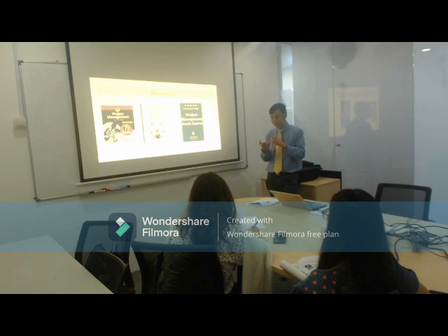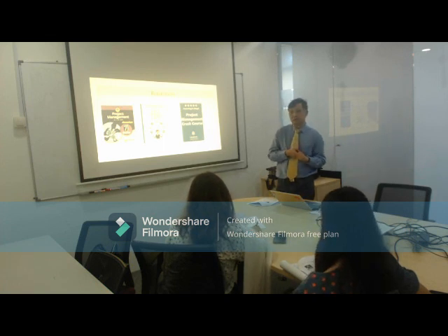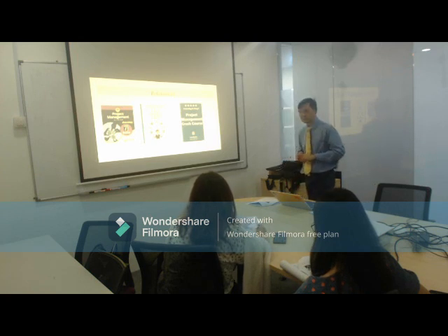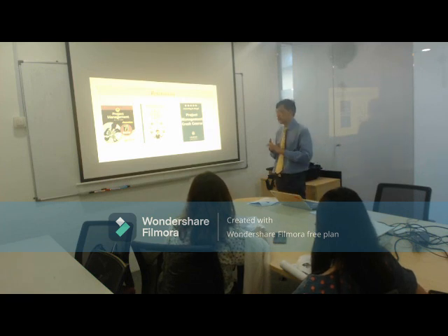When we go for the initiation phase, for example, one of the main things is something called a project initiation document, a PID. The PID is important. Why? It tells you who will be the project manager, what the resources are, and what the objective of the project is. So that's for project initiation.